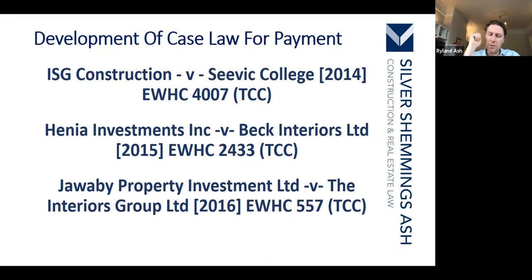And it's important to note that if you issue a pay less notice, the Construction Act says that it should be in respect of the sums that are payable or due on that date. In other words, the date that the notice is issued. So not necessarily the previous due date. So that's a nuanced point, a difference between payless notices and payment applications being in respect of the due date.